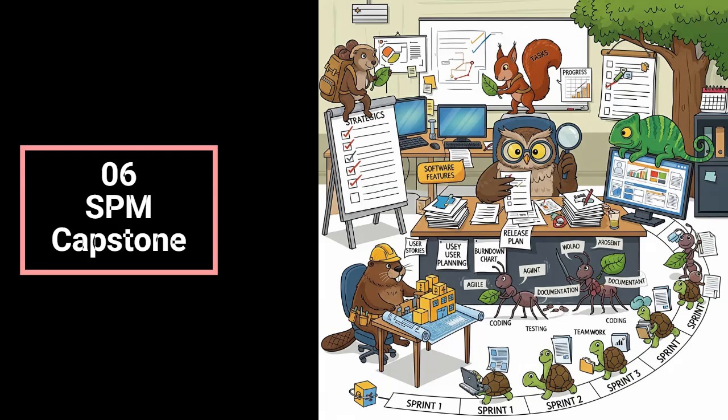Exactly. And then at the end of the week, there's a client demo. Showing the working software. That seems crucial for feedback. Oh, massively. Get feedback early, keep the client looped in. They also mention backlog refinement. Which is like tidying up the to-do list. Yeah. Pretty much. Clarifying stories, maybe breaking some down, reprioritizing the main list, the product backlog for future sprints. Lessons cover involving clients, the backlog itself, and the sprint review meeting where the demo happens. The demo ensures you're building what they actually need. Right, and backlog refinement keeps the future work pipeline healthy and ready.